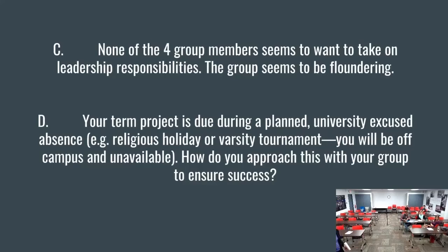The other key part of this, in addition to the accountability, is the communication. Particularly if it's the final deadline, something really important, getting your grant proposal submitted on time, getting your term project in on time. You need to, as a group, not just do it. Somebody needs to have the responsibility to do it and then let everyone know. So if you're doing it electronically, everyone should be CC'd on that email so you can see that it's submitted. If you're on a Canvas project, you'll be able to see that.